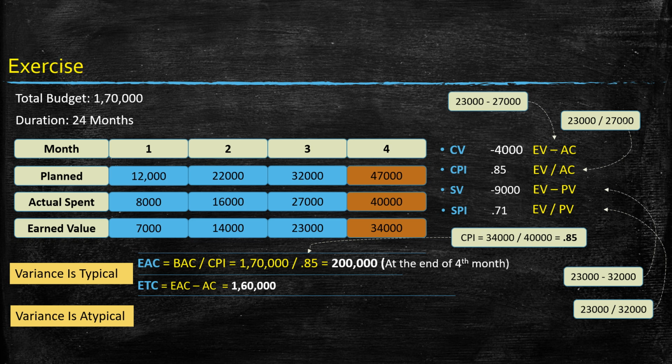Probably the raw material was purchased at a higher rate in the first 4 months, but now the local supplier has an adequate amount of stock with him, and he will supply us at a much lower rate because we've been dealing with him for the last many years. That means the variance is one time, and it is a typical variance.